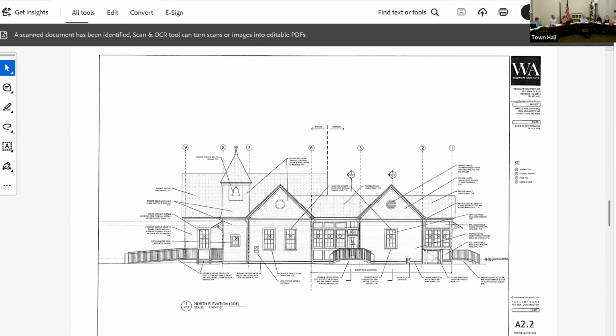So would you start on the detailed design upon the execution of the contract, when the estimate, the cost breakdown, comes to us in September? I'm not envisioning, well, who knows? We're looking at the cost, we're making decisions: maybe we don't do this, maybe we do this. Does that add to your timeline on the detailed design? Because we're doing those things concurrently. We're going to try to manage that process so that we concentrate on things that are not likely to change. But we thought it was worth that risk on our part to keep things moving. Yes. Okay.